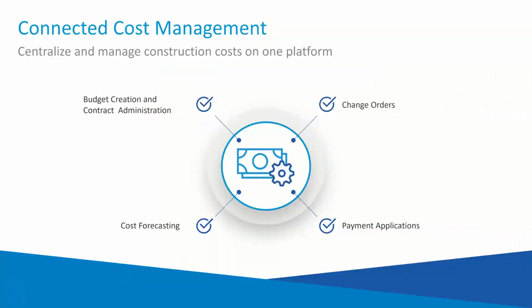Another part of it, and included with Build, is cost management. This is a very comprehensive tool. It's almost bigger than all of Build put together because it does so much, and it's for managing and creating your budgets and contract administration, especially and really geared towards the change order management system on a project, ensuring that you're staying on budget with a project when changes happen, and that's inevitable in every project.